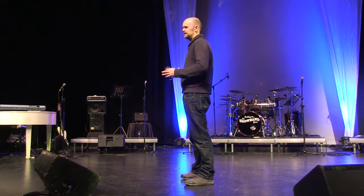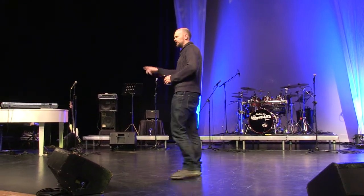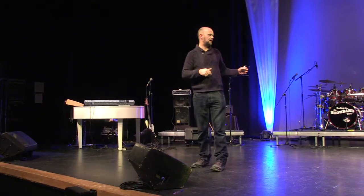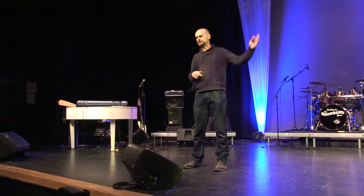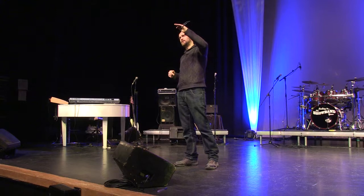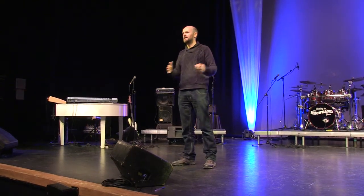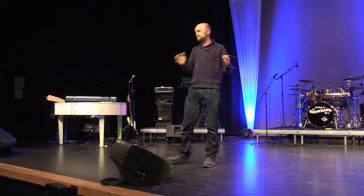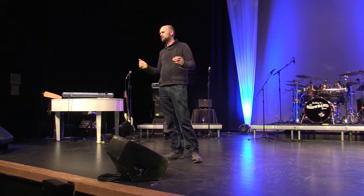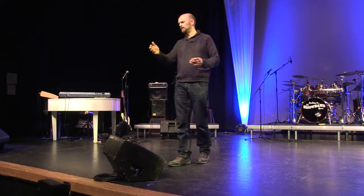It turned up at 1 o'clock yesterday. All of the equipment is their own, apart from the decks and maybe 2 monitors. They're running 32 lines of audio, 24 mic lines, and then return lines up to their own desk, which is also running a separate amp with 2 extra bass bins because he likes it nice and loud. That was all set up yesterday between 1 and 4, and then 15 musicians turned up and did a sound check between 5:30 and 6:30, and then it was presented to 300 people at 8 o'clock.